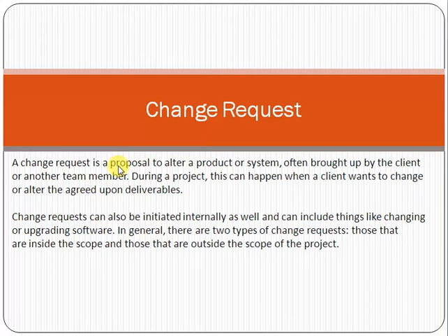Secondly, we have to see whether it is a change from the internal team or an external team, like from the customer side. Thirdly, it is very important to understand that it is not necessary that cost will always be incurred or associated. Many times it happens that something is a change request, but we deliver it to the customer free of cost. We say that this is our additional cost, our additional effort, but we deliver it to the customer through the change request free of cost.